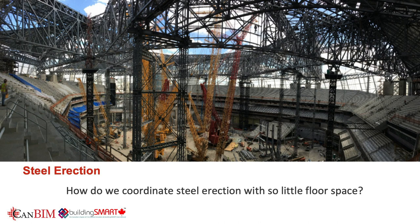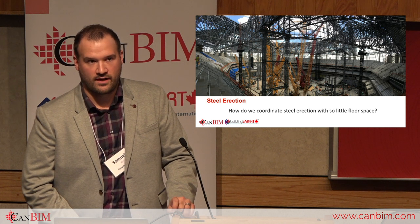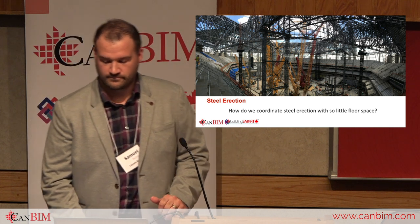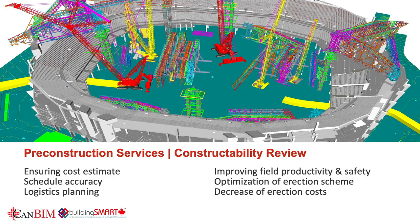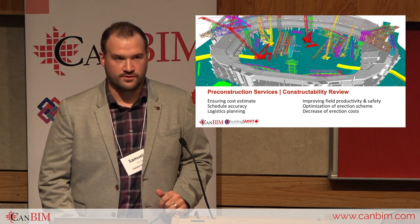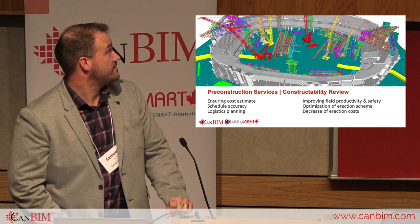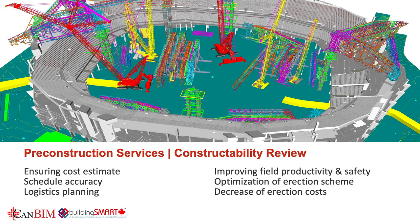Moving to our next example: how do you coordinate the steel erection with so little floor space? Can-Am has built over 50 major stadiums, and this is always a complex problem. Where do you lay down the steel? Where do you pre-assemble your parts? And how do you circulate with multiple cranes when the roof is closing in? The Falcon Stadium was our first experience with constructability review in a 3D environment — it is now part of the service we offer. The image here is a Navisworks model using Crane E-Max crane models. Working with the steel erector, we were able to review the steel erection at different sequences, making construction more predictable and easier to plan. Advantages include ensuring cost estimates, schedule accuracy, logistics planning, improving field productivity and safety, optimizing erection schemes, and decreasing erection costs.